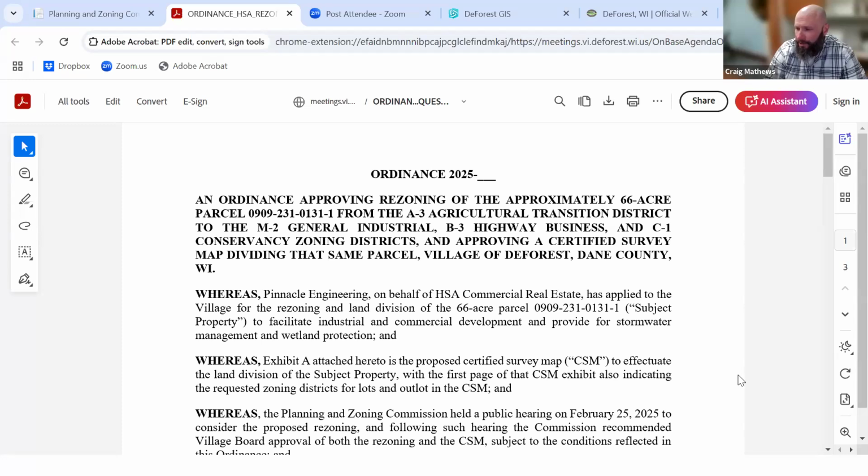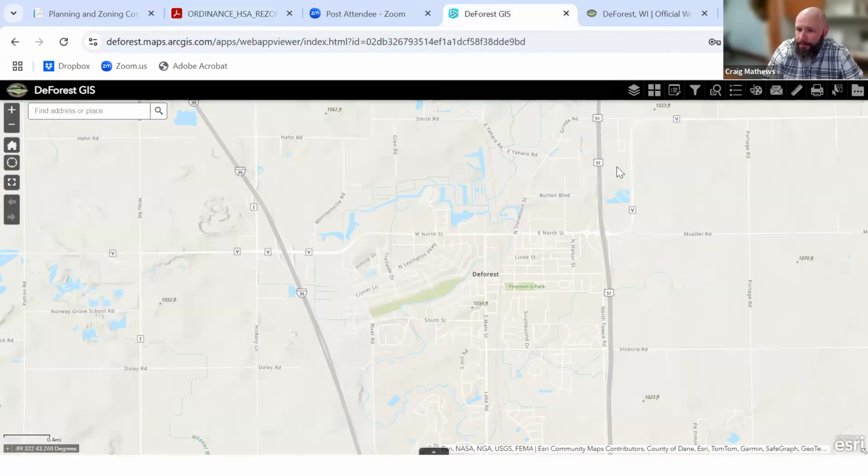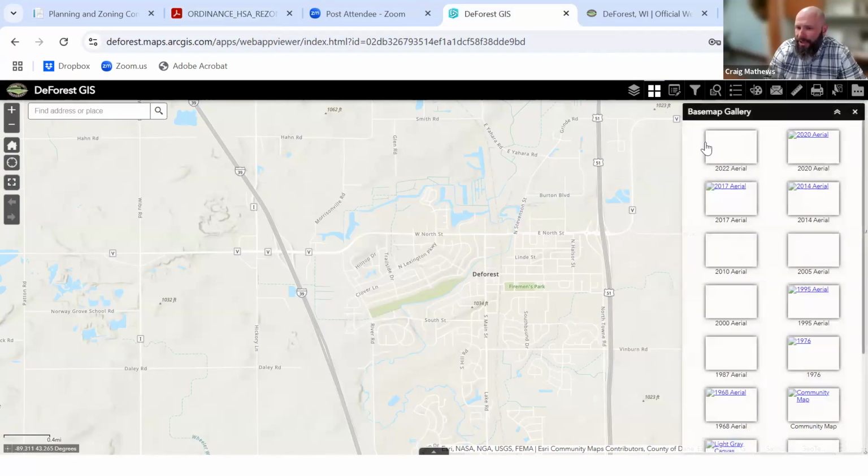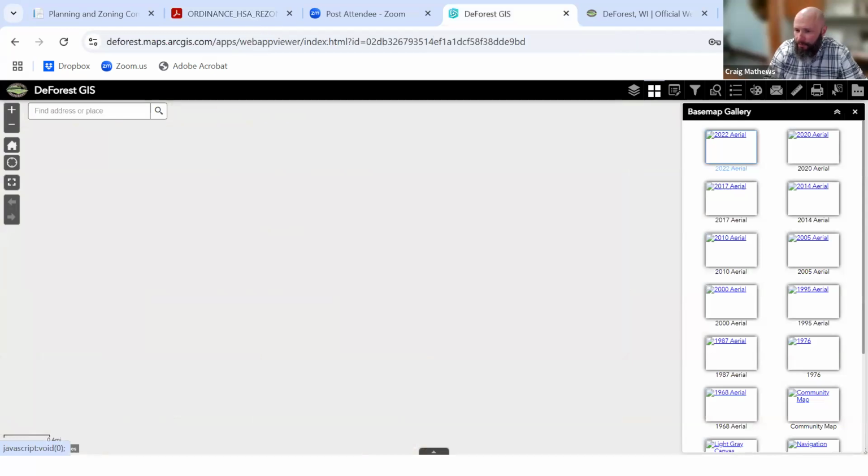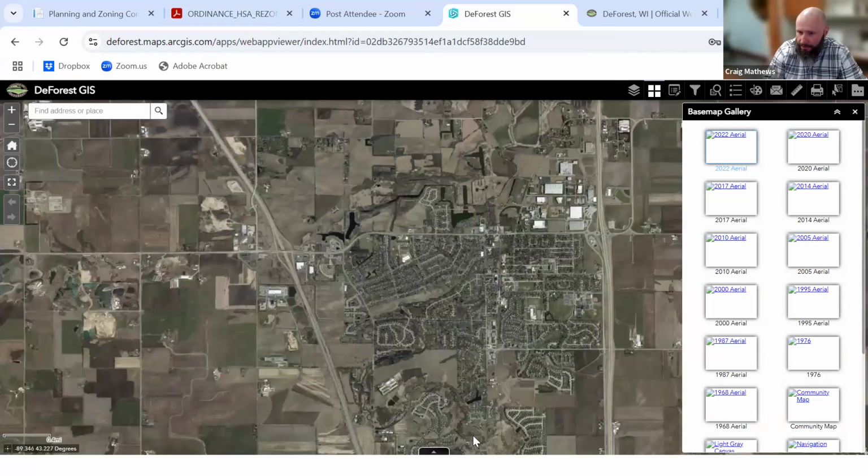Yeah, working with village staff right now, the upgrade of Hickory Lane is in the capital improvement plan for approximately 2 to 3 years down the road. We think we're progressing down a path where we'll make an interim improvement to upgrade the current pavement condition, widen it a little bit, and enhance the asphalt base course that's out there.